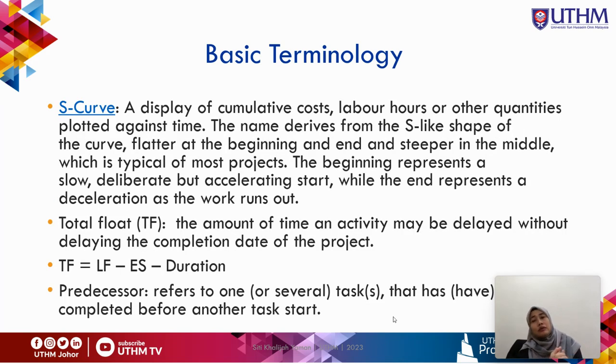And then for reporting, you have the S curve, financial or physical. This is the graph that usually the clients want to look into when you report on the progress of your project. The S curve displays the cumulative cost, or labor hours. Physical shows the labor hours and also the percent of completion, plotted against time according to the contract duration.